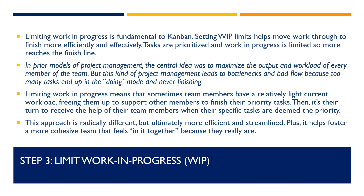Limiting work in progress means that sometimes team members have a relatively light current workload, freeing them up to support other members to finish their priority tasks. Then it's their turn to receive the help of their team members when their specific tasks are deemed the priority. This approach is radically different, but ultimately more efficient and streamlined. Plus, it helps foster a more cohesive team that feels in it together — because they really are.